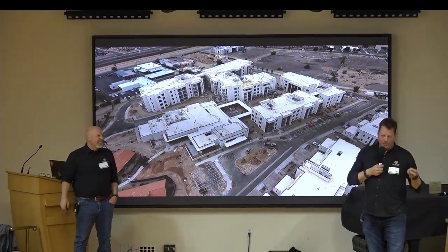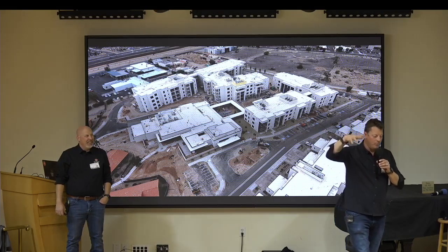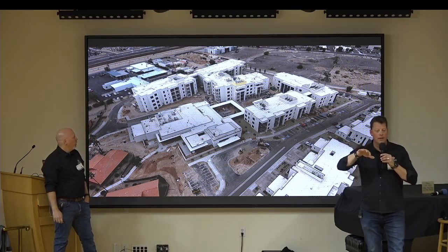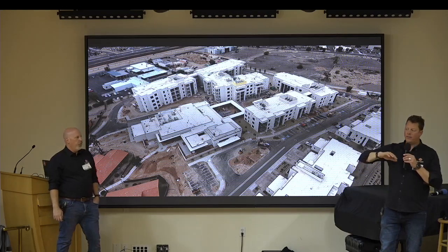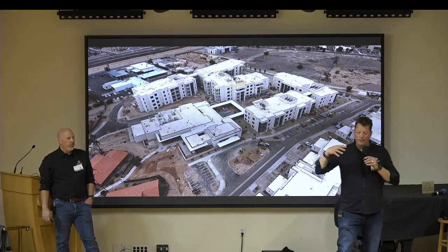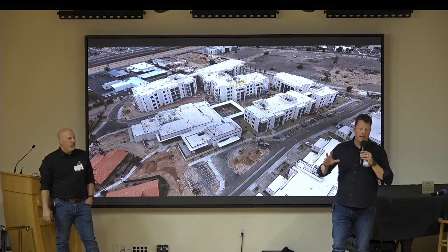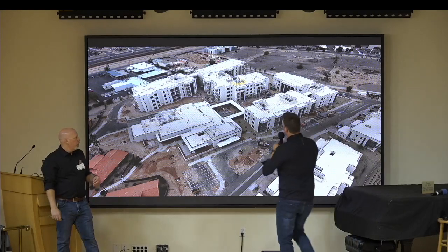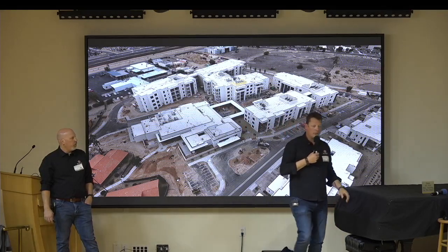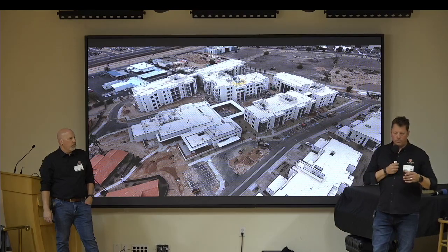So to address the bocce ball court construction, we're not doing anything right now because, as I mentioned during the flyover, it's kind of a staging area for us. It's where we're feeding the material into the building. We've got most of the sheetrock in the building, so that's behind us. The next upcoming work is the duct work that we have to get in there with forklifts. As we have been dismantling the scaffolding and getting the rest of the components out, it's a staging area for us as we transition from inside this building to the laydown yard. It's very laborious time-wise to transfer trash that way. The less time you can handle waste products, the better. So we're going to use that area for our dumpsters for a little bit longer.